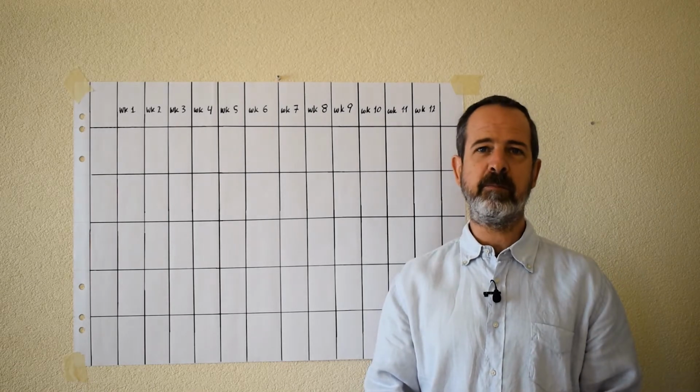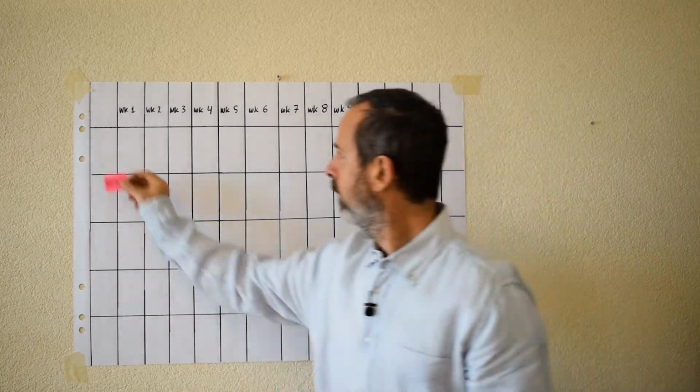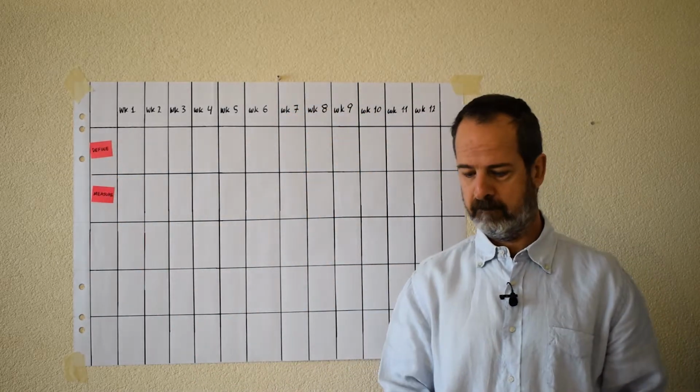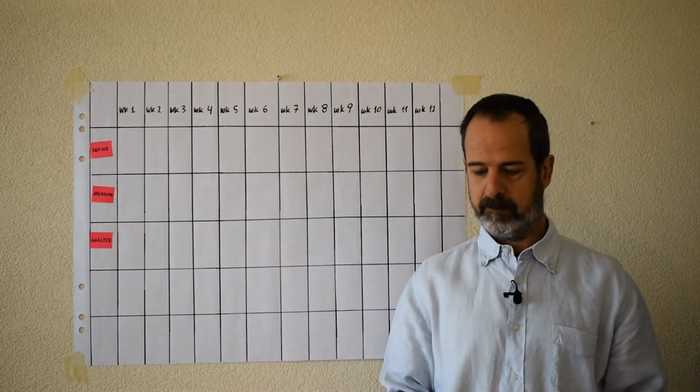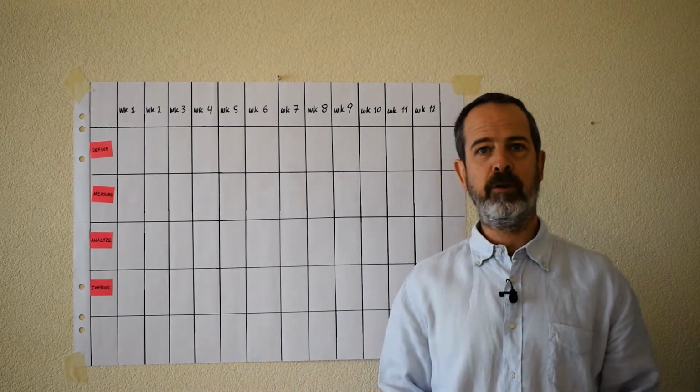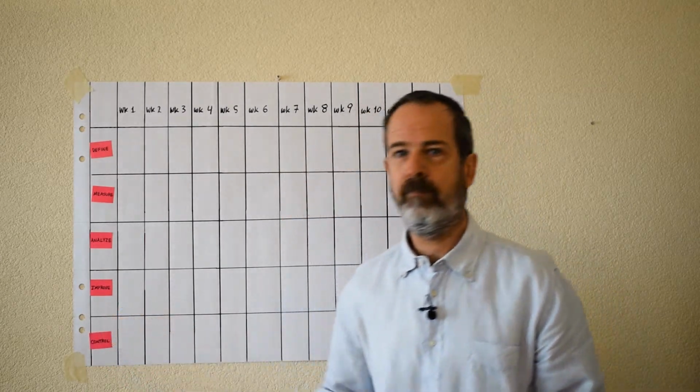For basic structured problem solving, we have 5 steps. Define, measure, analyze, improve, and control. Problem-solving projects are similar. With your team, think about the different areas to be addressed for successful completion of the project. These will include measuring the current situation and the size of the problem, analyzing and verifying root causes, implementing solutions, and standardizing the improvements. At this point, the goal is to highlight the bigger work chunks. You will consider the detailed activities in the next step.